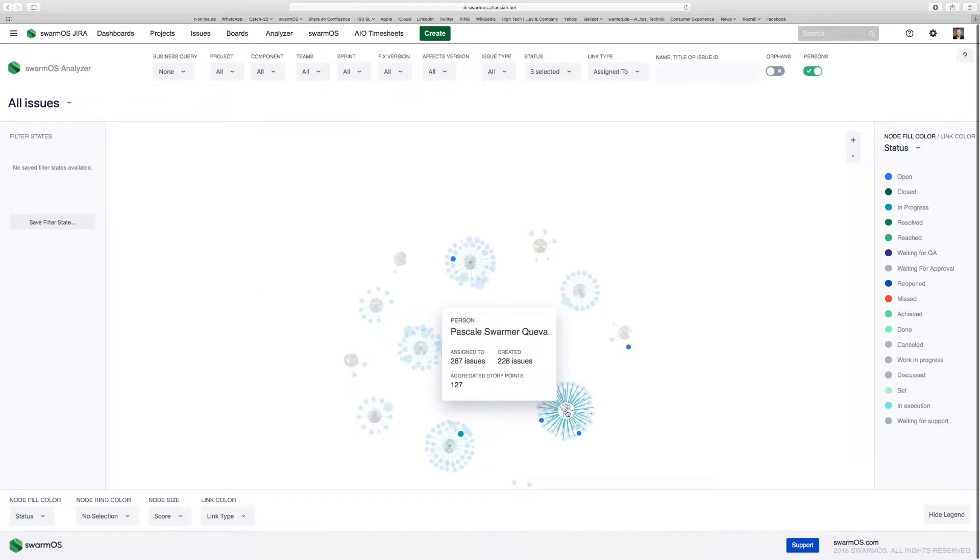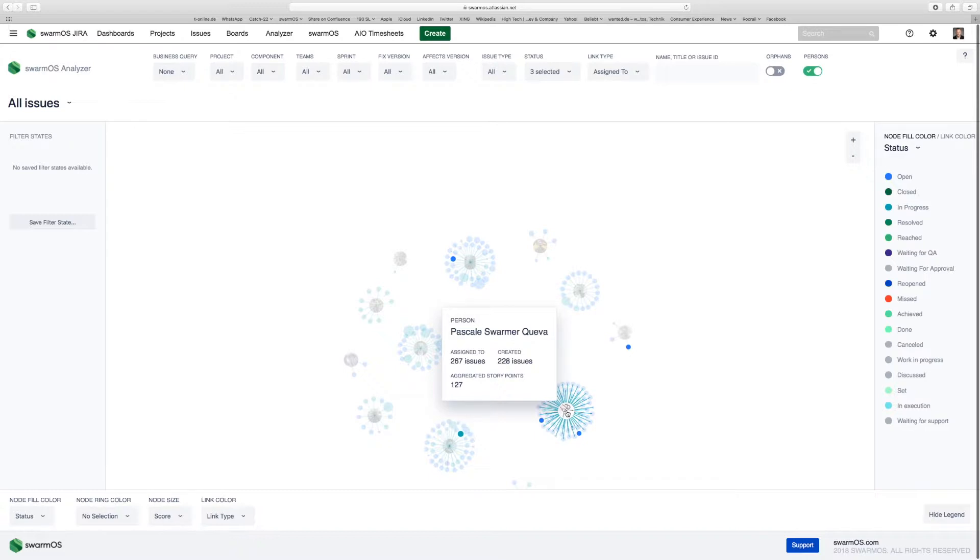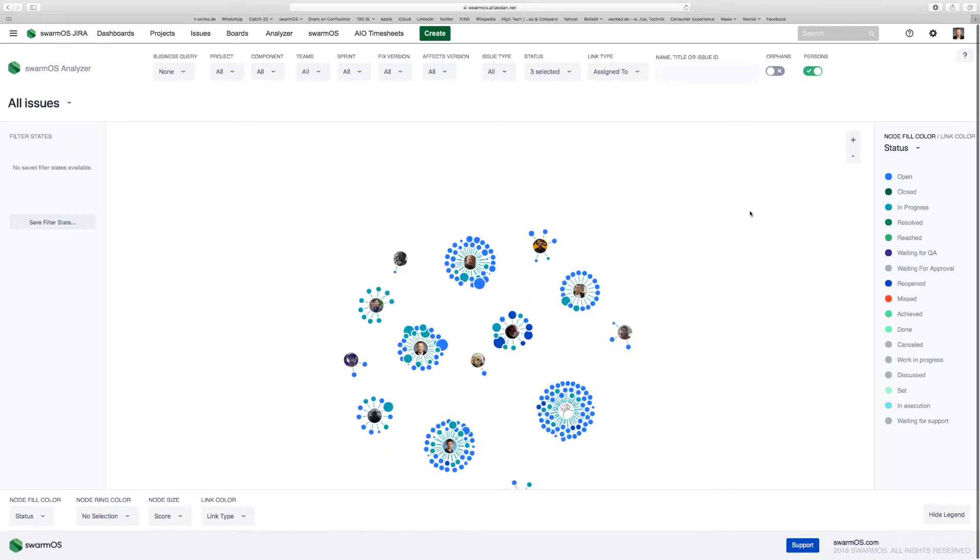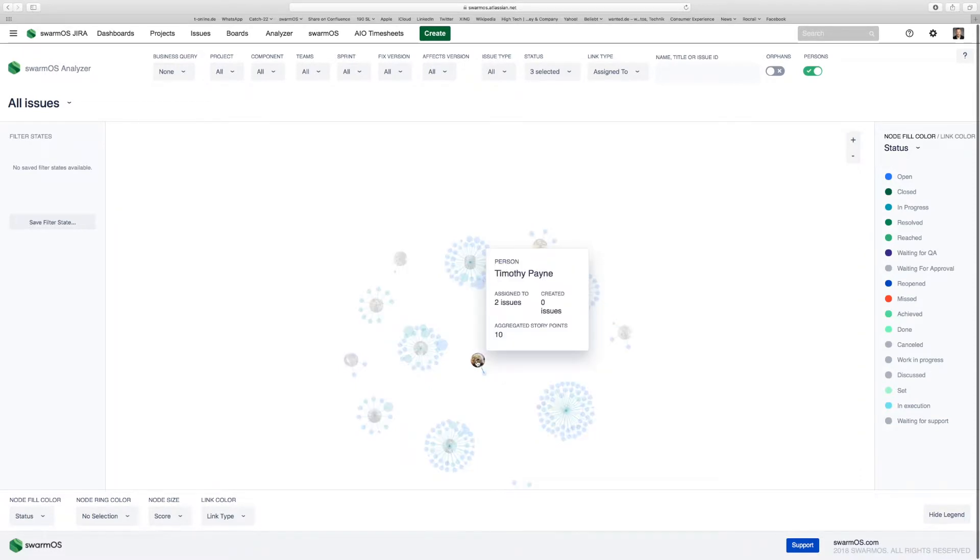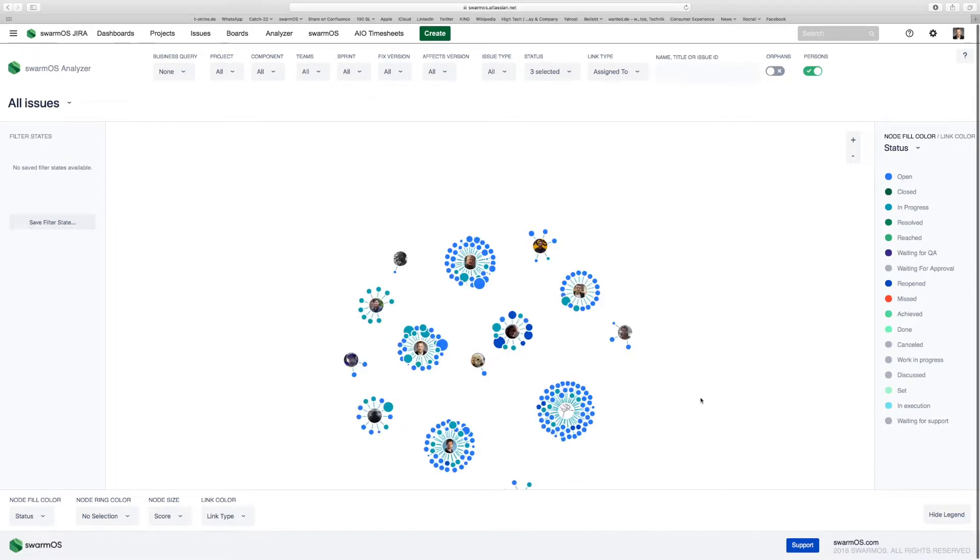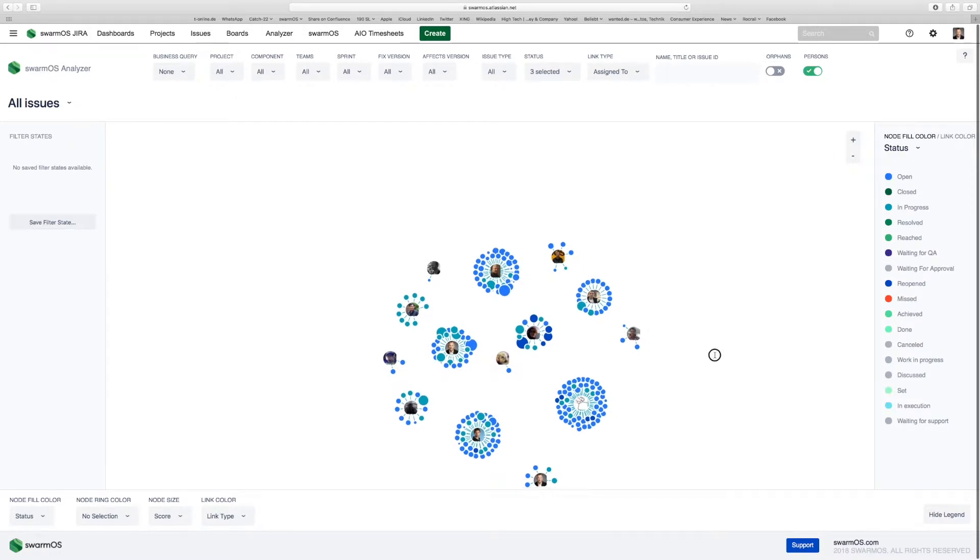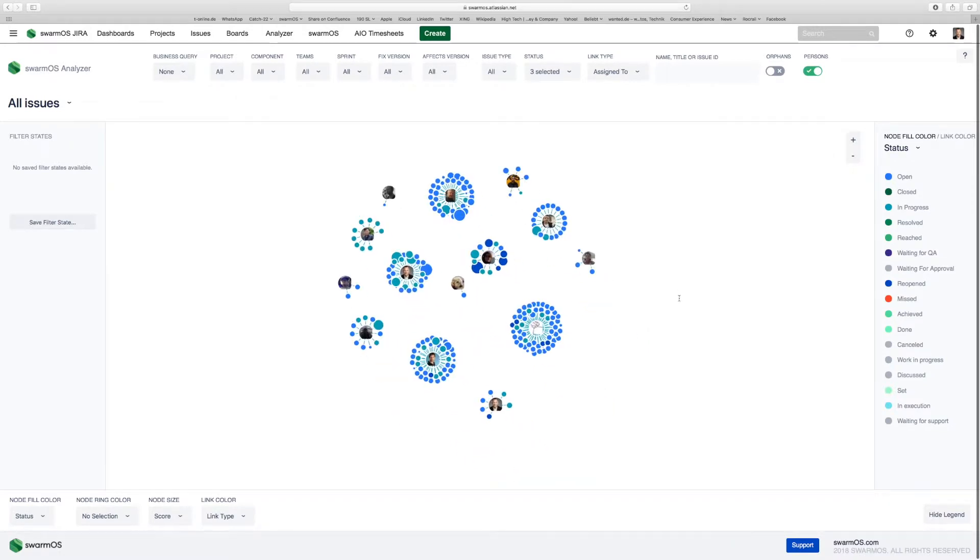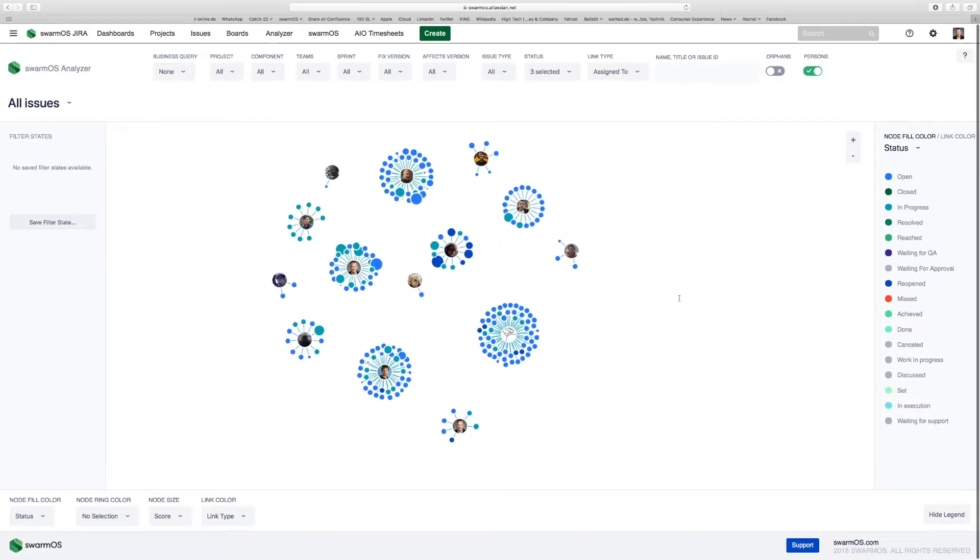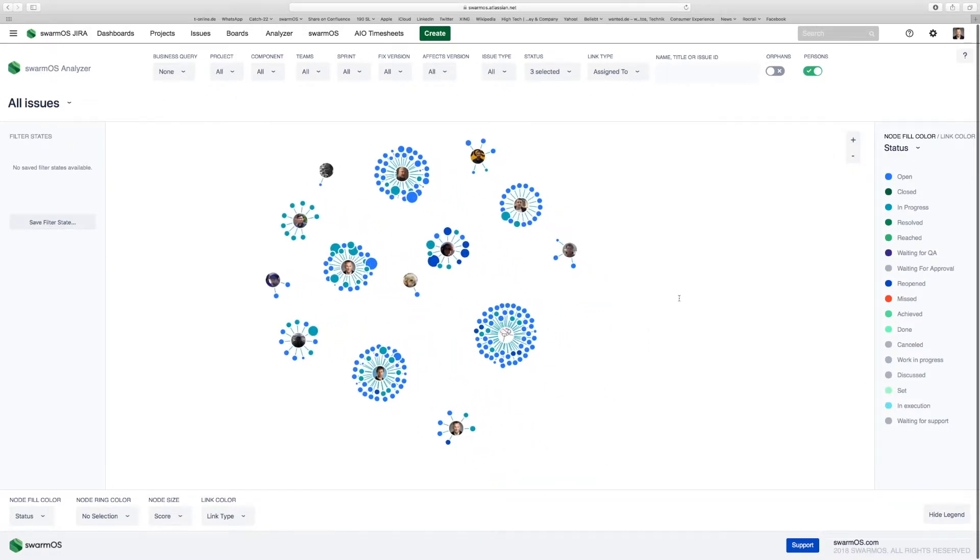If I hover over, for example, in this case Pascal has 267 stories assigned to her and 127 aggregated story points open. This is quite intense, while other people have only a few user stories left open. Like Tim has one user story to work on. So we can balance our network, see the most critical resources in our teams across all of the company and all of the projects to manage them accordingly. This is a pretty powerful feature.